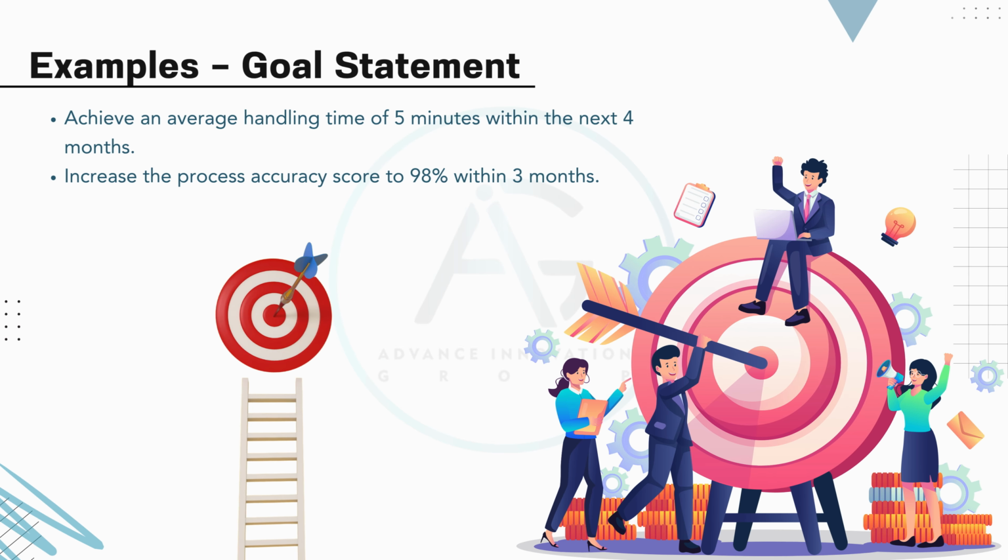On this slide, we see two examples of well-defined goal statements that clearly follow the structure we discussed earlier: timeline, target value, and focus area. Achieve an average handling time of 5 minutes within the next 4 months.